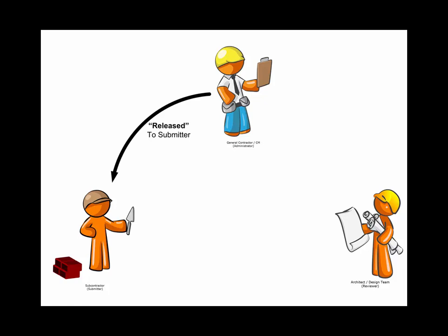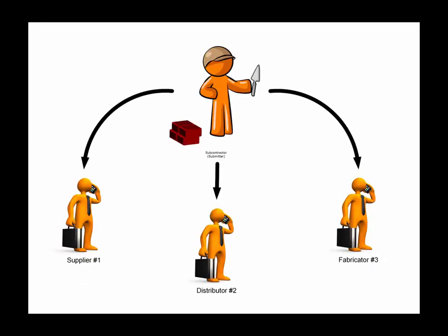When a contractor receives the notification, they must locate the required documents and upload them to the system. Usually the documents required for submission can be located on product suppliers' websites or created internally within the contractor. Websites like Dodge's Suites provide a service that helps subcontractors locate a wide variety of submittal documents, or the contractor may send the requests to the building product manufacturer and ask them to prepare the required documentation.